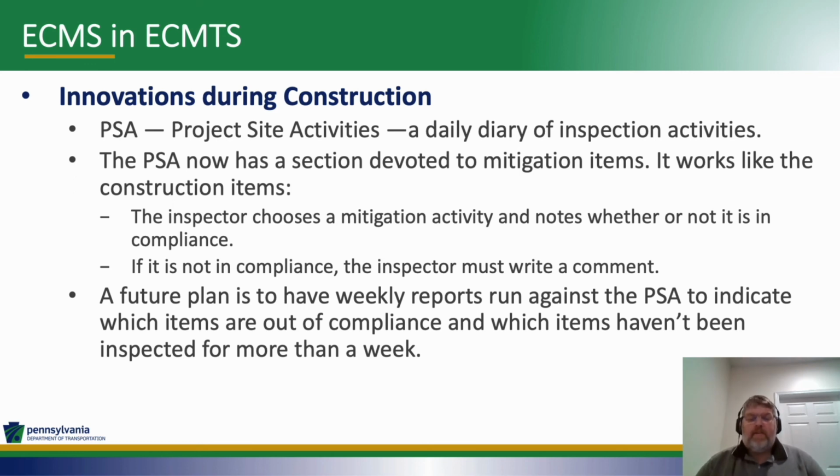Another part of this is inspection that is targeted directly to the mitigation activities. And for that, the project site activities, the PSA, was updated in ECMS and in the PSA app to have a section devoted to mitigation items. So it draws from the mitigation items that are identified in ECMS under the construction mitigation screen. And it works just like construction items. So an inspector chooses a mitigation activity and notes whether or not it's in compliance. If it is not in compliance, the inspector must write a comment and explain what's going on.